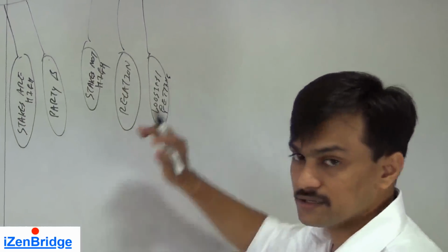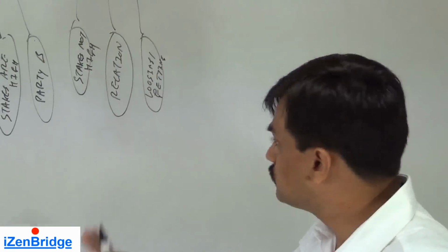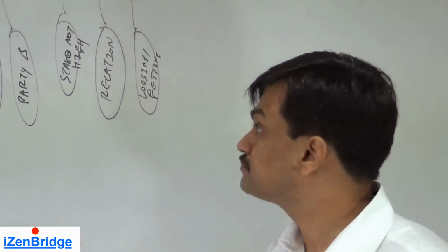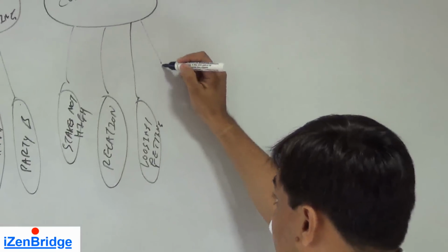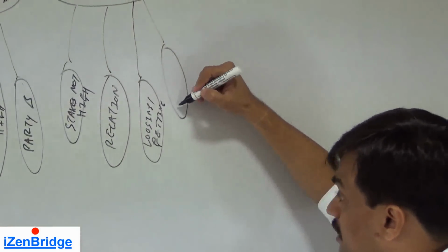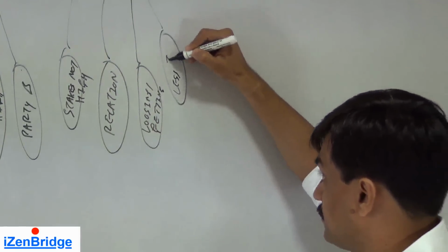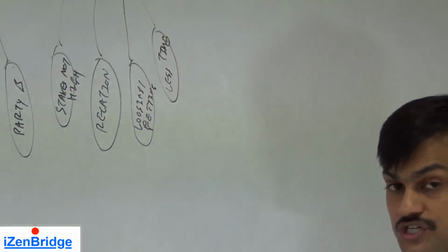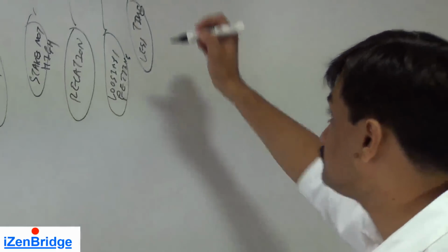It's not that we are getting the best solution, we are just compromising on something. It may not take that much time. Compared to collaborating and problem solving, it may take less time, because over a phone call we can just agree without getting into the details about why you need what.